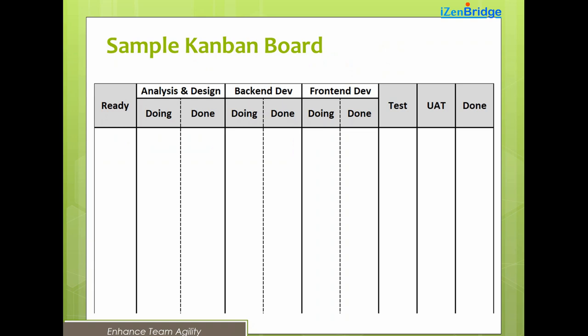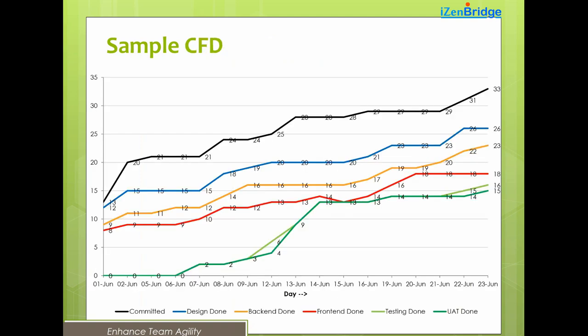Here is a simple Kanban board. The 'Ready' column on the left is not the backlog — backlog would be further left. 'Ready' represents items the team has committed to, very similar to how a team pulls five or six items at the beginning of a sprint. Every week, a team typically pulls some items from the backlog into 'Ready.' This is one particular team's board — your team's board doesn't need to look exactly the same.